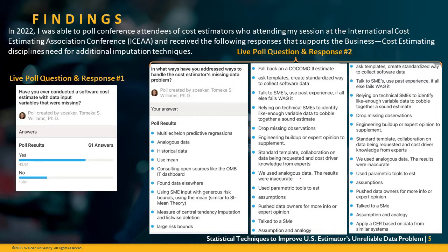Overall, the best thing that came out of it was that there is some degree of improvement: you can get pretty close to predicting or forecasting data that's not there. The bottom line, depending on how I sliced the data, is that SI, simple imputation mean, had the strongest level of predictive accuracy at the data set level.